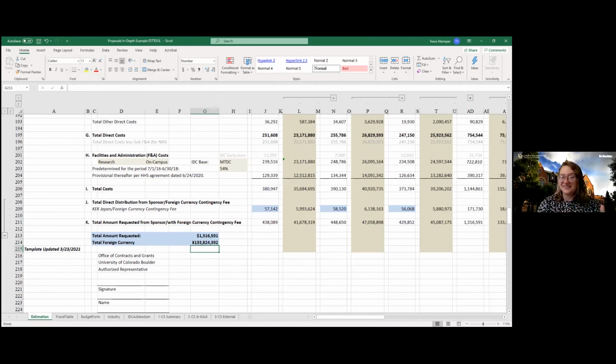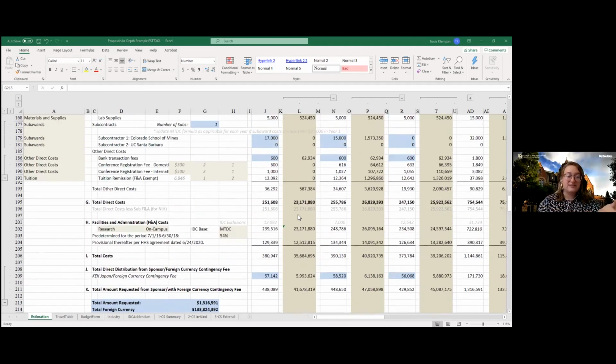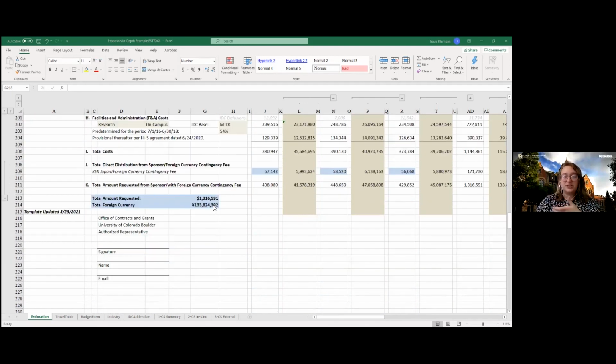So that is a ton of information. That's why we're recording this. You guys can come back, watch that again. Remember how to do the absolute references so that when you drag down, it's going back to that same conversion cell. But we went ahead and dragged down. All of it is now dollars and yen side by side, easy to see and understand. We added our bank fees, we added our contingency fee, and now we have total in foreign currency, total in USD. And then once this was all done, we would send off that foreign exchange risk acceptance form.